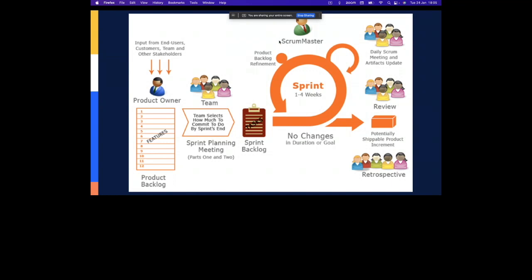First of all, the product owner would explain the requirement, show demos, and explain what the actual need is, and the team would ask questions and clarify. Then you do a sizing exercise where your whole team gets together, and depending on each individual's understanding, they give a relative sizing, and then you agree upon a size.